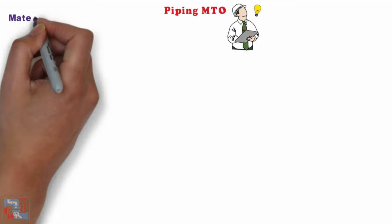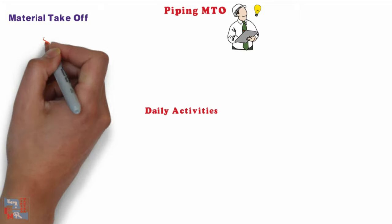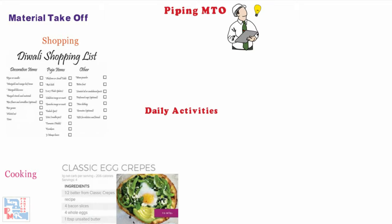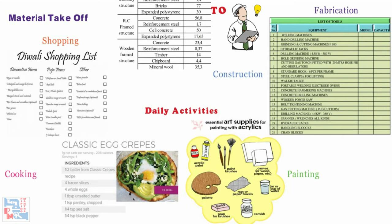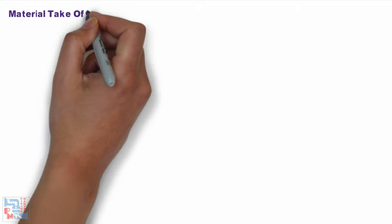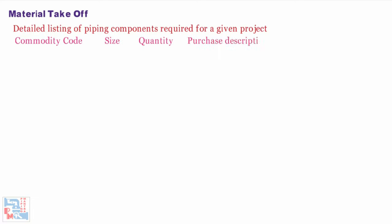MTO stands for material takeoff, and in layman terms, MTO tasks are involved in most of our daily activities whether it is shopping, cooking, painting, fabrication, construction, and many more. Material takeoff or MTO of piping items is a detailed listing of piping components required for a given project. It includes commodity code, size, quantity, and purchase description for all the items.